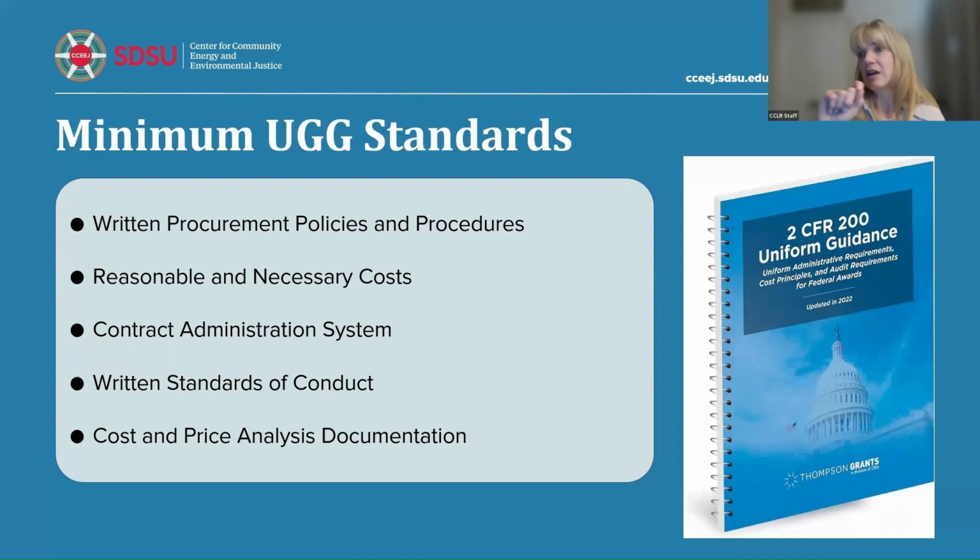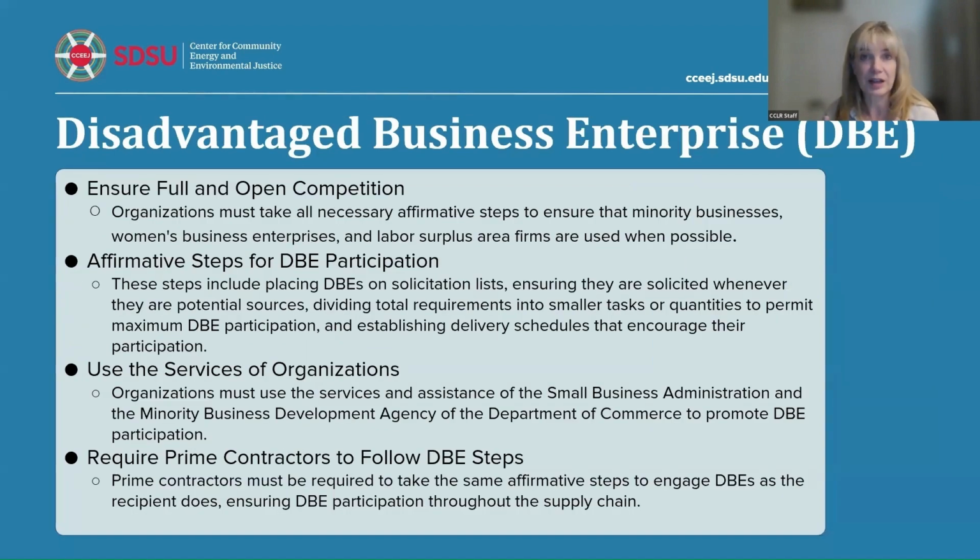For example, I talked to a sister city and they said they just bought one and the supply chain has been disrupted because of COVID. Therefore, the payloaders are now 3 times what they were back in 2019. So you have to have that documentation in your files. This is all before you go out for procurement. So make sure you're dating documents as well.